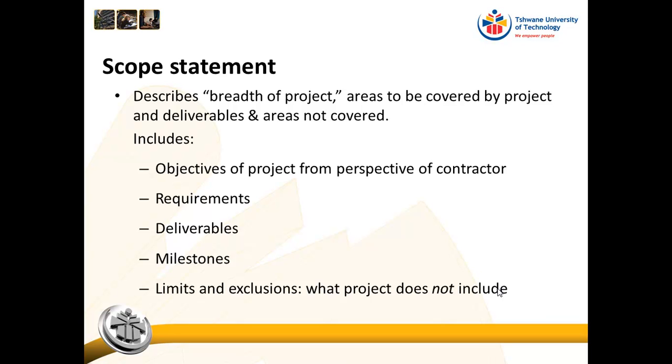Or, for example, if I say I'm building this road and I will include lighting, the client can then turn around, if I don't limit how my lighting will be implemented, and say, okay, you said that you were including lighting, so we want a light every 10 meters. Whereas at the back of my mind, when I thought about it, I was actually thinking, okay, I'm going to put a light every 100 meters.